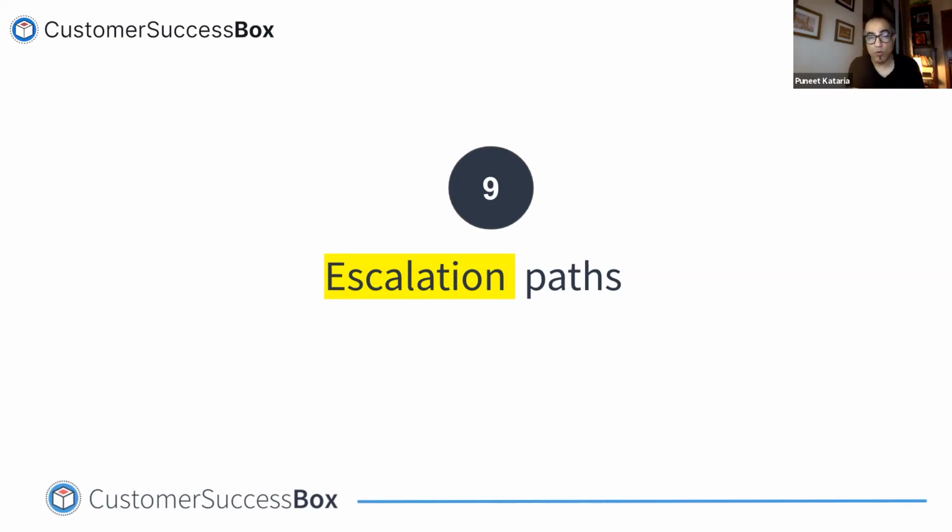Fine, you can take 2 more weeks, but that is going to have an impact of, let's assume, equivalent impact, which means your go live date is now going to move from 25th of August to plus 2 weeks. Sometimes you can accommodate, many times you can't. But what I want you to do is, the minute something is missed, you make that communication, and that communication needs to go to all stakeholders, especially the sponsor.